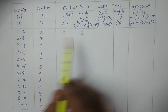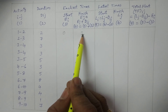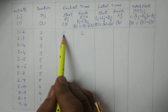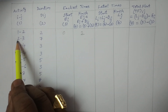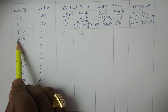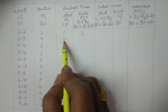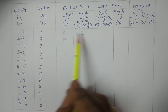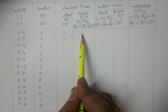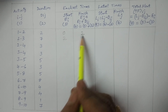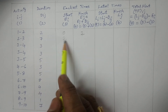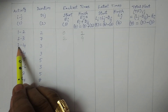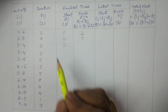For I equal to 2, the E2 value is 2, and it is carried forward. So 2 plus 7 equals 9. For the next row where I is also 2, E2 is 2: 2 plus 3 equals 5. What is E3? Observe 2 to 3: J equals 3, so E3 equals 9. Therefore 9 plus 3 equals 12. For 3 to 5, I equals 3: E3 value is 9, carried here. 9 plus 5 equals 14.